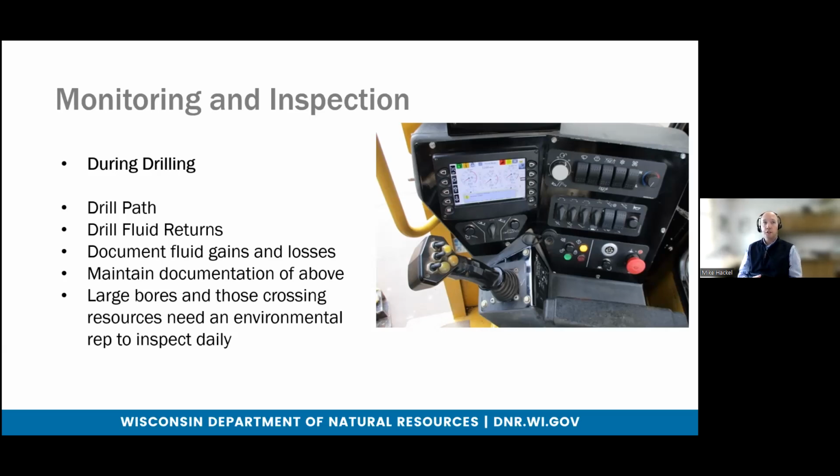And on large bores and bores that cross resources, you also must have an environmental representative inspecting the site at least once daily to verify the monitoring and reporting by the contractor, as well as to walk the drill path and do their own investigation for potential IRs.